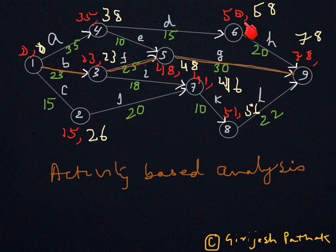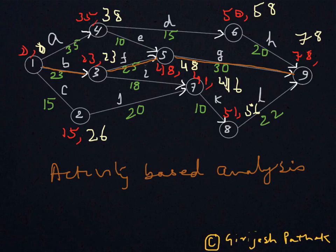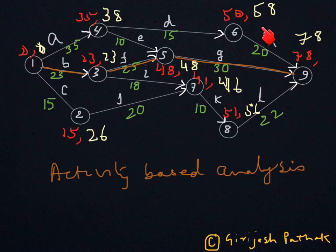As you can see on node 6, there are two numbers written: 50 and 58. So 50 is the earliest time and 58 is the latest time. The earliest time means you can't be on that node before 50 days, and the latest time means if you are not on that node by 58 days, the project will be getting delayed. We have earliest time and latest time for all the nodes.